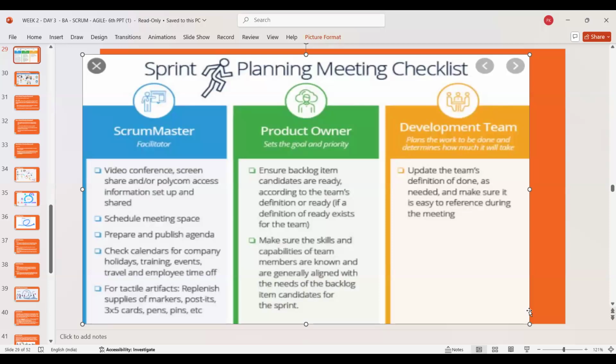When we say generally aligned with the backlog items, it means are we on track? Earlier, if we have completed, say, priority 1 to 5, then from the next point we should be starting priority 6 onwards, right? So it's not only about the order or number, it's also about the priority. If the team is able to work on it, do they have any other dependencies? Are they comfortable technically, understanding why? That is the responsibility of the product owner, to get that clarity during this meeting.